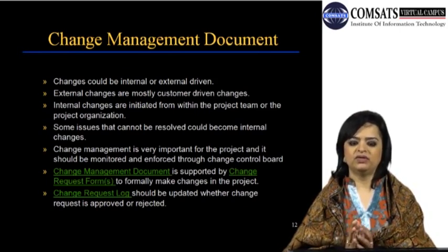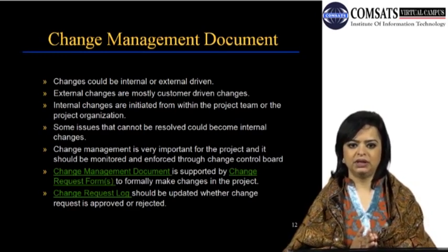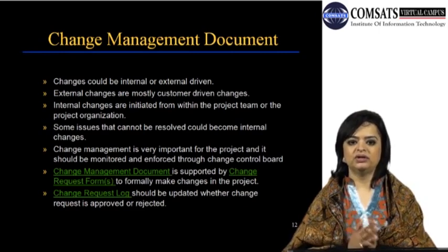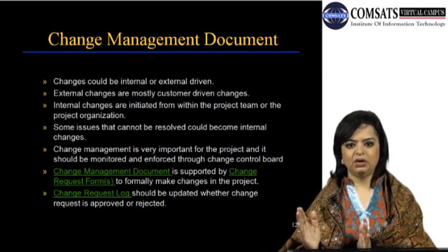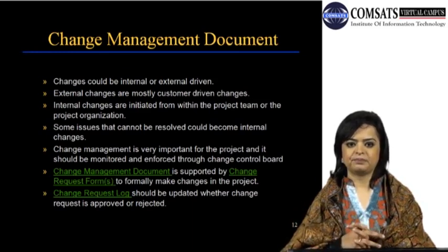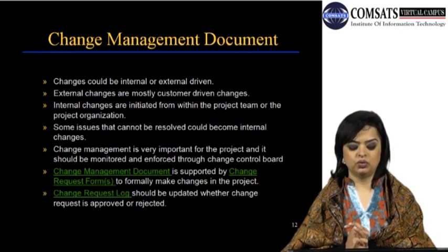If it's a 4-minute change, it still needs to be documented, but doesn't need to go through the rigorous change format. If it's a 4-week change and may change the end date of the project, then it needs to go through the change control board.